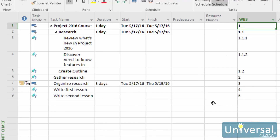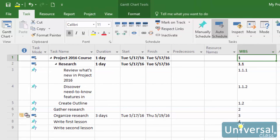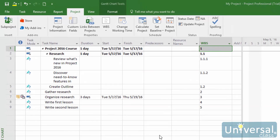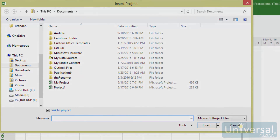In addition to adding tasks and organizing them, you can also insert another project into your project. This is helpful if your project is dependent on work being done on another project. For example, let's say a course on project management had to be written before we began writing this course on Project 2016. We could insert that project into our Project 2016 course. The project will appear as a task with its tasks appearing as subtasks. To insert a subproject, click on the Subproject button under the Project tab. Then select your file and click Insert.